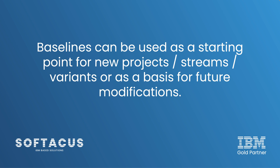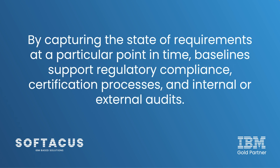That's why when you are creating a new stream from an existing stream, this new stream is created from a baseline. Even though you didn't create any baseline yourself, this baseline was created automatically, and it serves as a starting point for the new stream. Another thing to consider is that you may need baselines to support regulatory compliance or certification processes, or both internal and external audits.